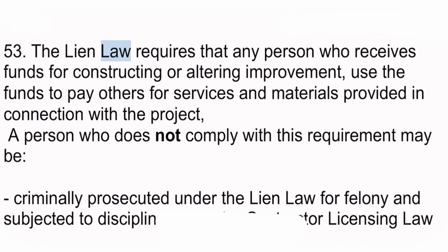53. The lien law requires that any person who receives funds for constructing or altering improvement, use the funds to pay others for services and materials provided in connection with the project. A person who does not comply with this requirement may be criminally prosecuted under the lien law for felony and subjected to discipline under the contractor licensing law.